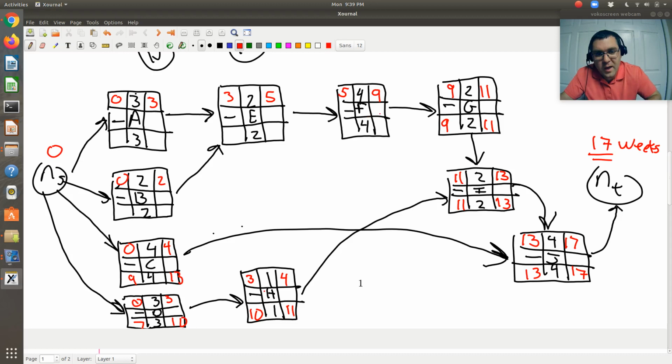Okay, going to F. So therefore the latest possible finishing time of F is 9, has a duration of 4, so latest possible starting time is 5. Going to E. So therefore the latest possible finishing time of E is 5, has a duration of 2, so the latest possible starting time is 3. Okay. Now we've got to look at E and A, B.